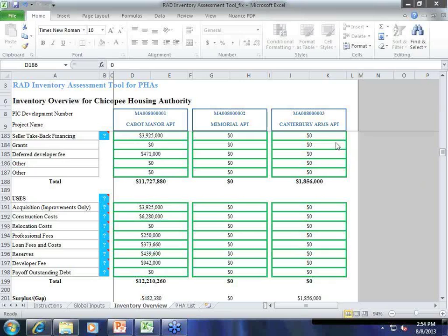Okay. Yeah. And I would add just one small thing. This is Kathleen. If you're thinking about doing 4% bonds and tax credits with any of the deals that you're currently doing improvements on, you'll want to go ahead and talk to bond legal counsel, and they will want to draft up what's called an inducement resolution for your board to pass, because in many states you need to have that in place, and then any rehab that you do after the bond inducement resolution is passed can be included in your tax credit basis.